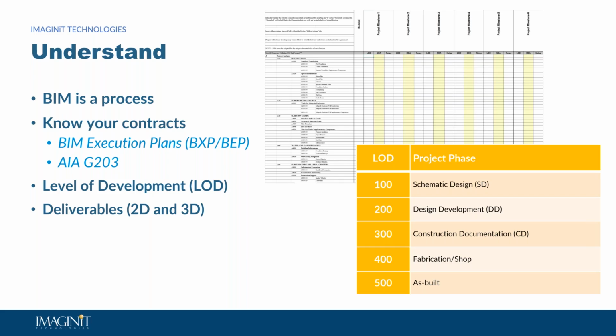Hopefully that's tracked through your project management, marked up in document sets, and then the model is updated. But there definitely is a requirement, if it is outlined that certain systems have a 500 requirement, that someone is responsible for updating the model. Even though it's already gone through 100% CD, it's being constructed, someone is responsible for making those updates.